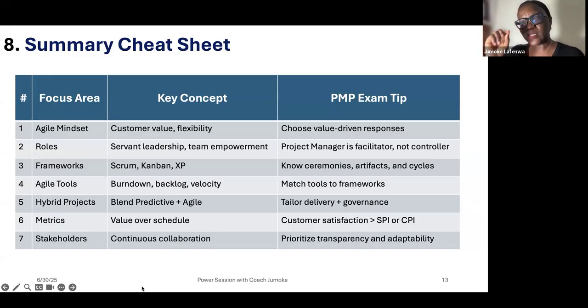If you get less than 1, what it means is you are spending more than the work you are accomplishing. It means the project is likely going to cost more. There will be cost overrun. If you divide EV by AC and you get 1 point something, it means you are very, very efficient.